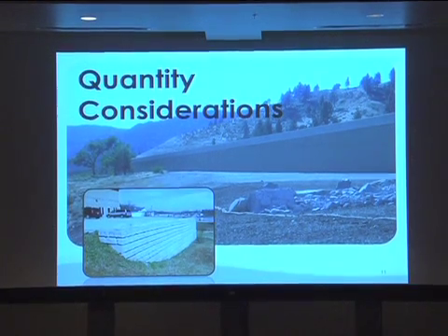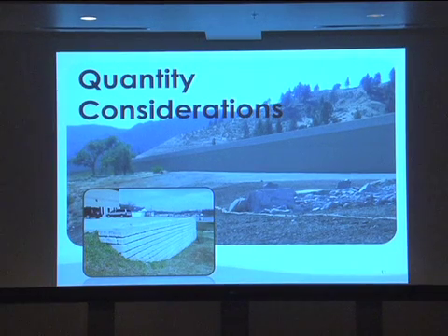And the number one thing I look at is how much. If I got 50 tons of asphalt on my job, I'm going to certainly get a different price than if I have 50,000 tons of asphalt. So quantity is the next big thing that I start drilling down into. And that's really where it starts to get a little bit different too. This is a lot of what Tommy talked about: who do I think my prime contractor is going to be? Is he an asphalt guy, or is he a structures guy because I have a lot of structures on my project and the asphalt's going to be subbed out?